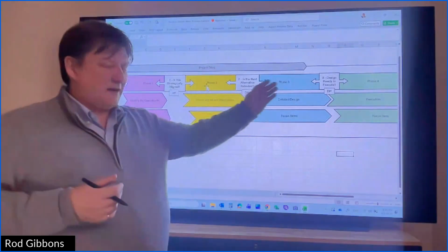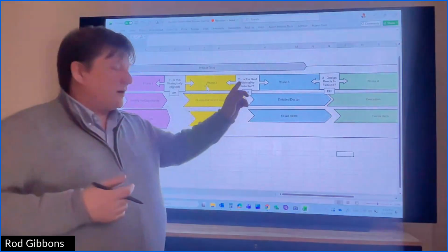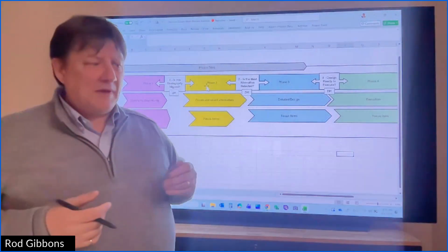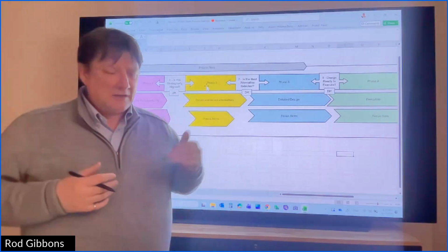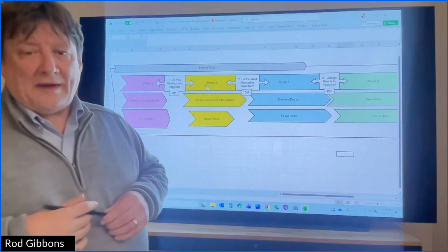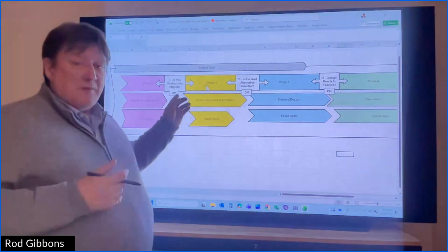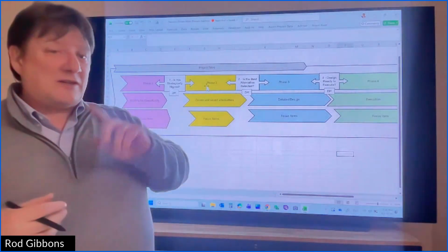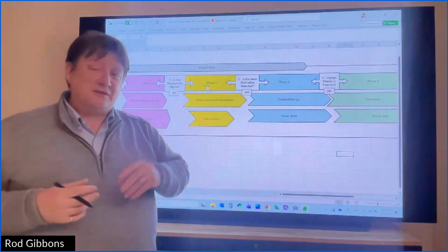for each one of these decisions is a very important step, and it can be a different decision maker in each phase. A lot of companies have authority levels for how much can be spent, and so that often changes the decision maker, or a functional versus team-based organization. But a lot of times when you put someone down here as a decision maker, that's the easiest way to find out if that's the right person, because you'll be told if it should be someone else.